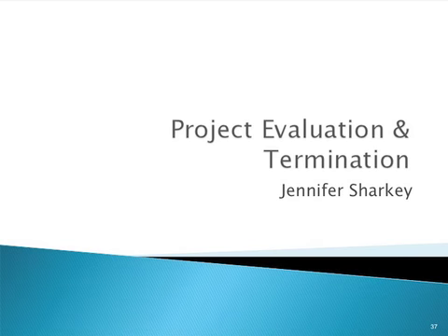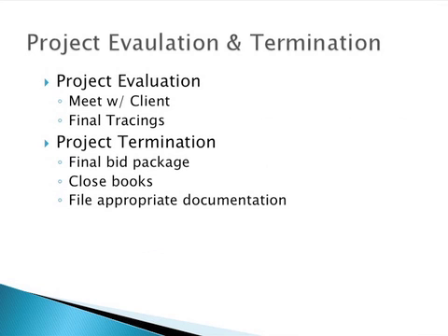I'm Jennifer Sharkey, and I'll wrap up the presentation by discussing the project evaluation and termination. Due to the various stakeholders in this project, there are two project evaluation steps. First, a meeting is conducted with the client to ensure that expectations are met for the design. Second, final tracings are submitted to the State Department of Transportation to ensure that the trail design meets all state regulations.